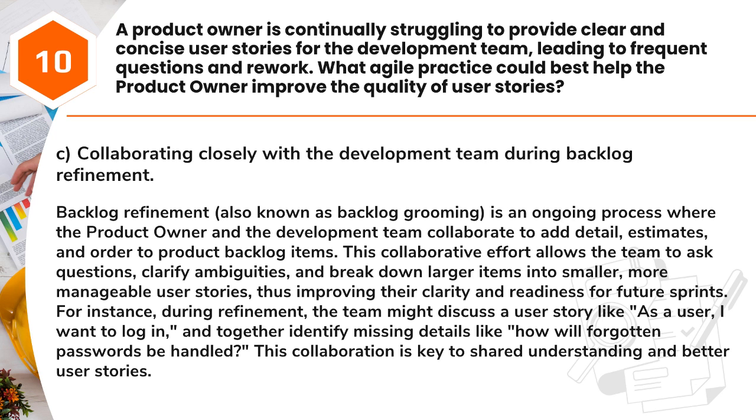For instance, during refinement, the team might discuss a user story like, as a user, I want to log in, and together identify missing details like, how will forgotten passwords be handled? This collaboration is key to shared understanding and better user stories.